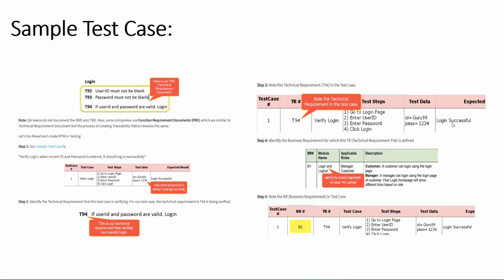What is the status? So let's say inside solution you have sub processes, for example, as is process map. So we already know what is an as is process map. That is to come from your business team. So for as is process map, you are having a status, baseline due date, actual delivery date. So you are tracking it here. Video recording. So sometimes we ask for a recording session of the entire process from the business.